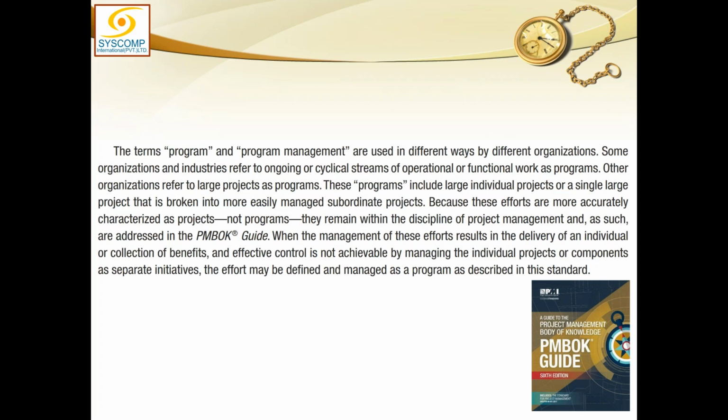Whomsoever is going to take it over, he will test it according to those requirements. This you are delivering a product, right? So you are either delivering a product or service or a result, but at the end of the project you are delivering this. But definitely, when it was planned to construct this school, there must have been some business case, there must have been some reason, and there must have been some ultimate benefit which would be delivered to the society or that community, right? But the project manager only is made responsible for construction of the school and not to run the school, not to educate. But still, when he is constructing that school, he would keep those requirements in mind and plan accordingly, as if it can accommodate the requisite number of students which had to be trained there.